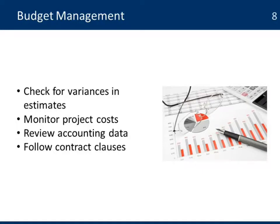Here are some tips to help you on budget management. Check for variances in the estimates, like schedule and time estimates. Cost estimates are not always accurate and they tend to change — those changes are usually external to the project, like currency fluctuations. Inflation is another element that will have an impact over time on the cost of the goods and services your project needs to procure. Monitor those projects.